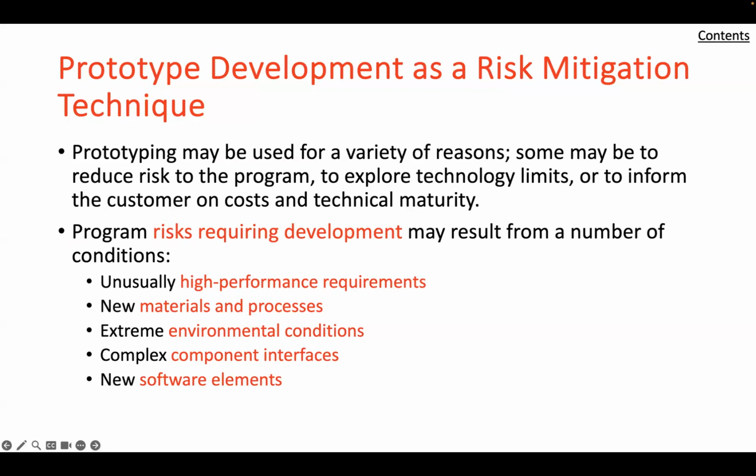As in the case of functional characteristics, the most likely areas where proposed component implementations may be significantly different from previous experience can be classified into four categories. One, components requiring unusually stringent physical performance, such as reliability, endurance, safety, or extremely tight manufacturing tolerances.